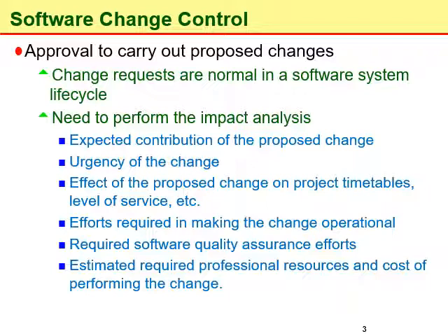For example, what level of testing after incorporating the changes is required has to be determined, because the organization has to make sure of the availability of the testing resources accordingly. Then the estimated required professional resources and cost of performing the changes, that is also important to analyze and determine before the proposal for change is accepted in the project.